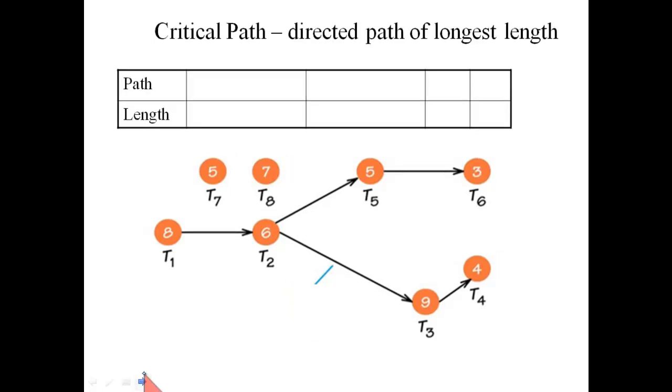There's something called a critical path that helps you identify the bottlenecks specifically. What we'll do is start with a task that has no prerequisites and then just push it forward through the digraph to create a path that's as long as possible. Here's an example. Task 1, of course, has no prerequisites. No edges come into task 1. So T1, and then I can construct a path T2, and then a path can go to T3 and T4.